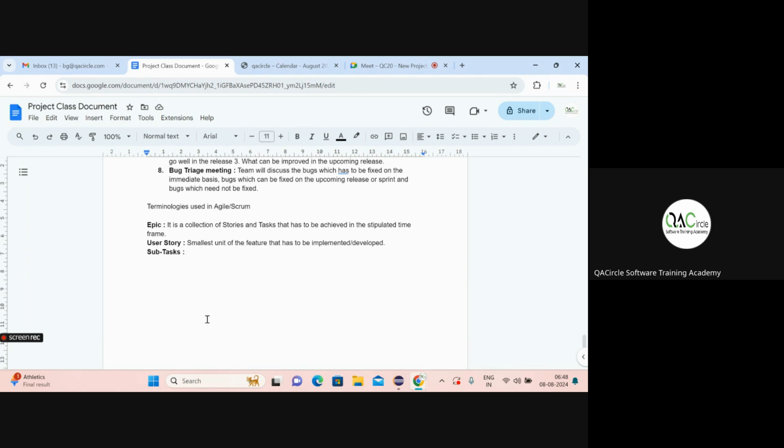Why will they create these subtasks? Basically for tracking purposes. So the engineering manager or the lead who is leading that particular project will get to know what all the developers are working on with respect to that particular story. That is the reason they create a subtask, and based on that subtask, they start implementing and achieving things.